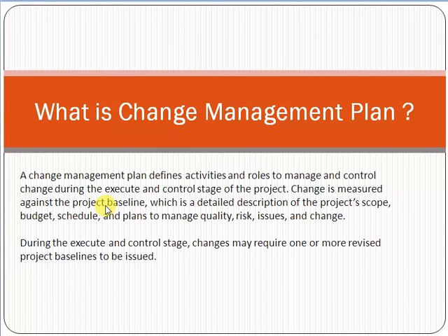It has major impacts. So you need a solid change management plan before this stage. Okay. So during the execute and control stages, changes may require one or more revised project baselines to be issued. Remember one thing, that whenever a change comes into a project, there are very high chances that your baseline will also be revised. What was the baseline?